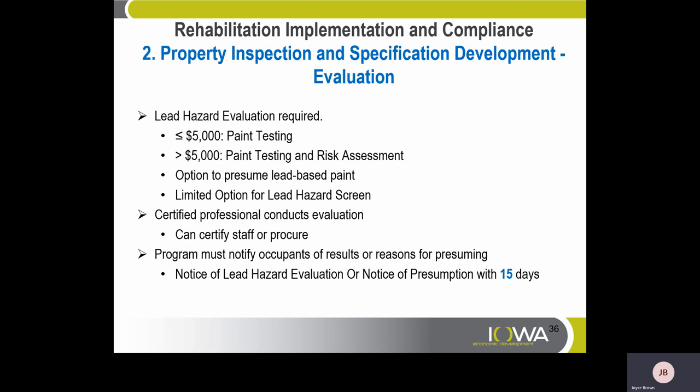Step two continued — Property Inspection and Specification Development Evaluation. Lead hazard evaluations require: for projects less than $5,000, paint testing; those over $5,000, paint testing and risk assessment; with options to presume lead-based paint and limited options for lead-hazard screening. Certified professionals conduct the evaluation. The program must notify occupants of results or reasons for presuming within 15 days.